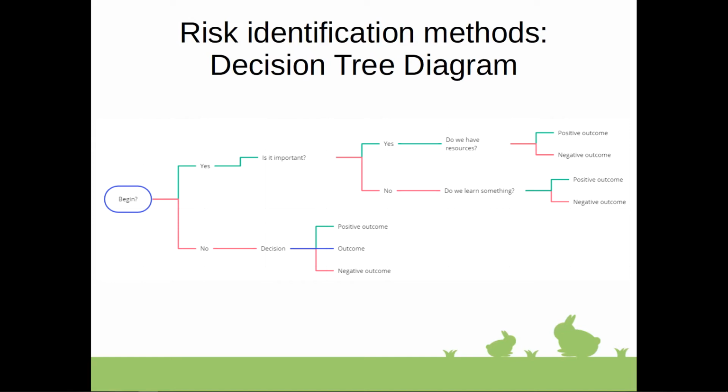There is one method called the decision tree diagram. Essentially, it's a visual way of representing how decisions are made when faced with multiple options. It allows you to assess the values of outcomes and the possibilities of achieving them. So, the first step is to identify decisions, and you prepare the diagram based on decisions, the cost of each decision, and the rewards of uncertain options which are available.